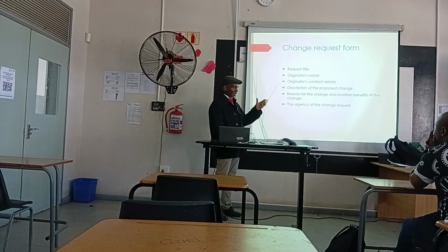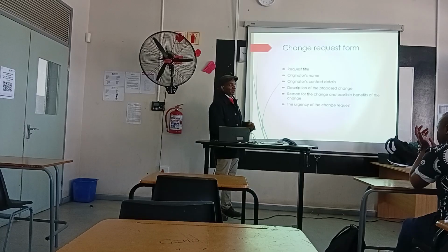For example, let's say window B was previously a steel window, and you now want that steel window to be replaced with an aluminum window. Then you can say replacement of window B, steel window to aluminum window, something of that nature, right? You can use that as a title so that once somebody sees it, at a glance, they can know exactly what such a change request form is all about, if you will.